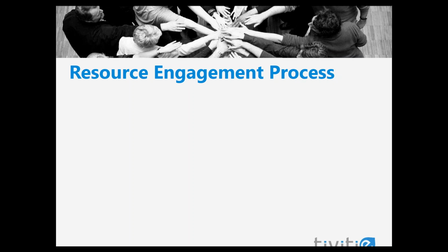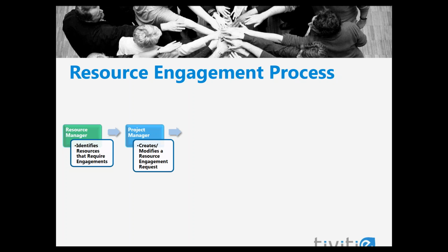The resource engagement process includes steps for both the resource managers and the project managers. The resource manager will specify which resources require engagements. This is done in the Resource Center as part of the resource definition. Once this is set up for an individual resource, it will not need to be done again unless there's a change in whether that resource needs engagements. You should have guidelines that determine which kinds of resources will require engagements. Check with your PMO or administrator to find out what the guidelines are for your organization.